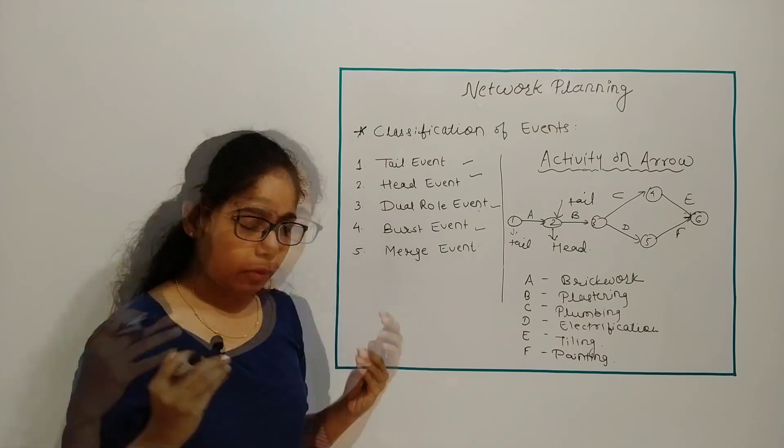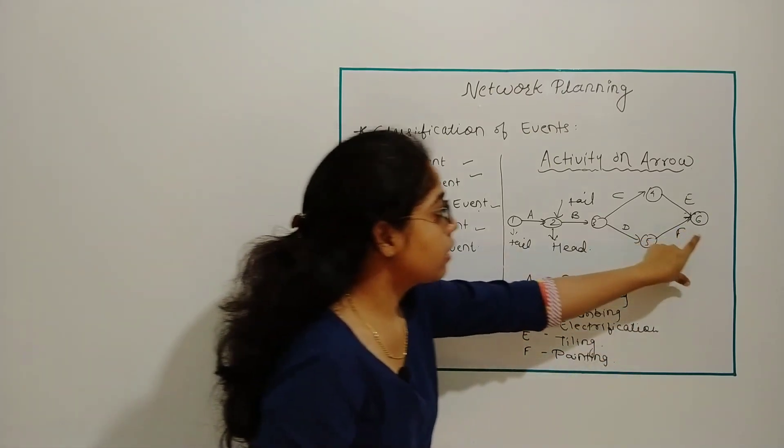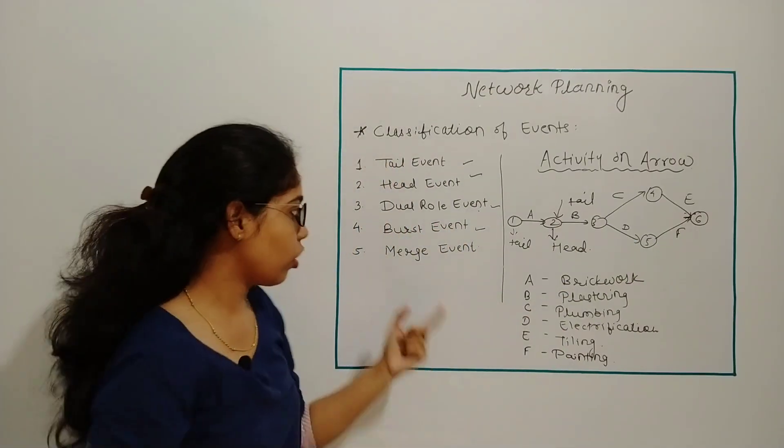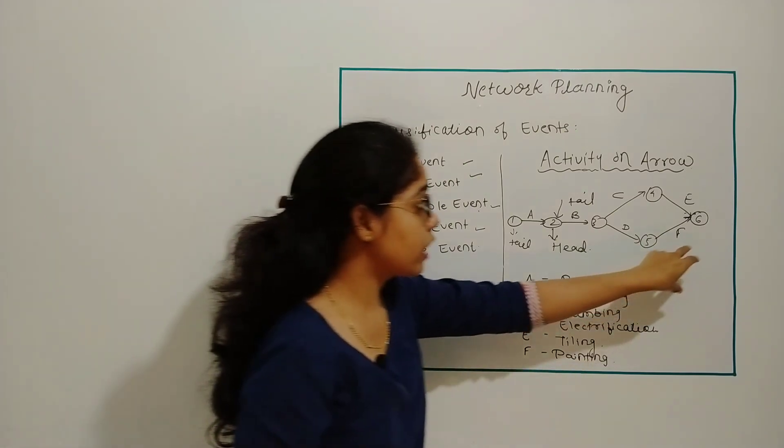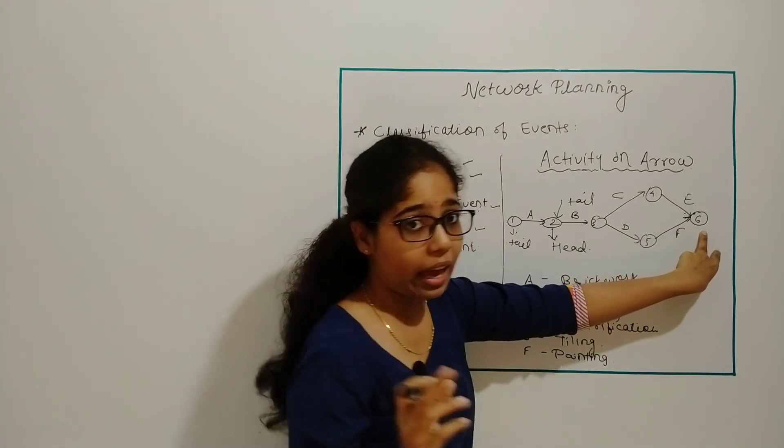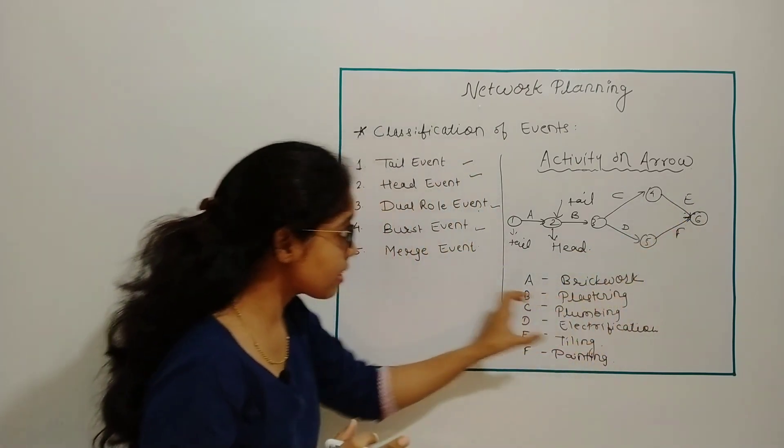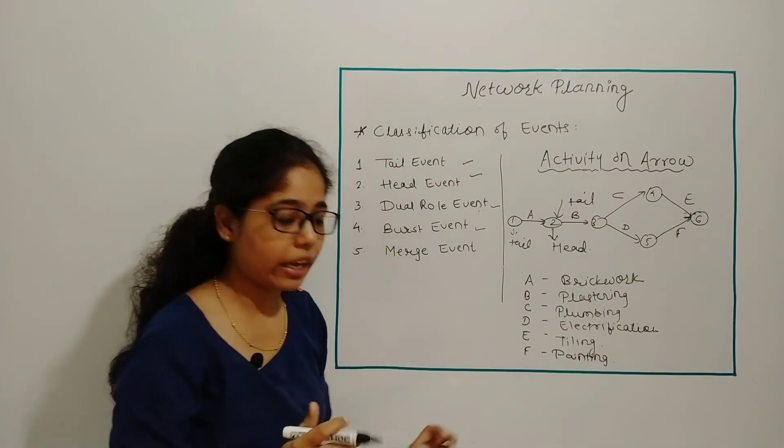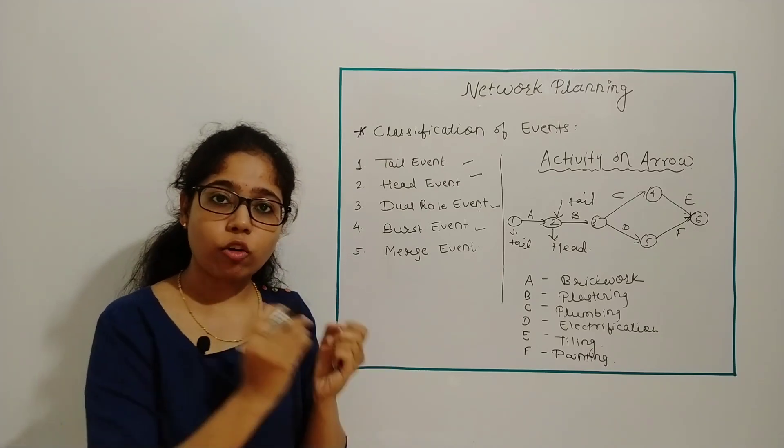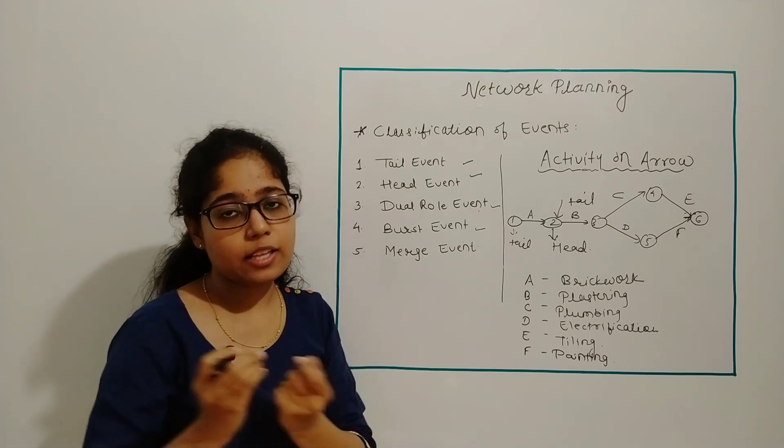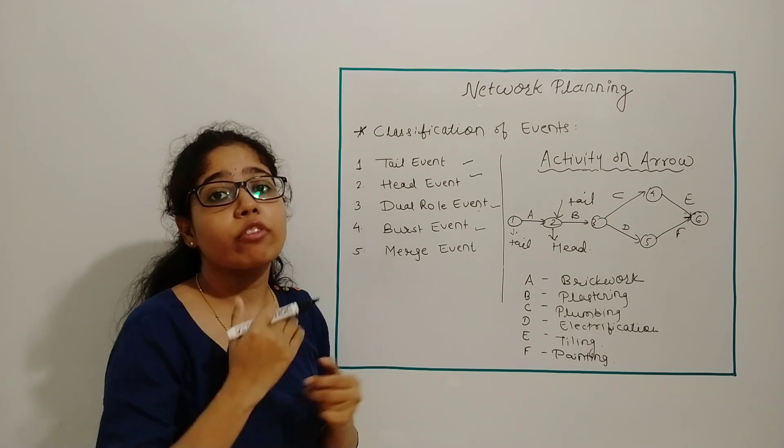Last is your merge event. If many activities are merging at a single point, then that single point is called merge event. So here node 6 will act as merge event for activity E and F. This is the network planning or network diagram which is useful for critical path method as well as PERT analysis, from which we have to find out the total duration of the project.